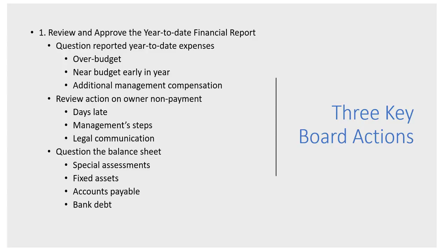The monthlies are okay. I'm not a big fan of monthlies myself, but you can go back to this and you can look at that year-to-date. So if you're in June, you could argue maybe that most of your contracts might be halfway through. So you could look at that and compare that to where you're actually at, and are you really at that 50% of the expected expenditures? If you are, I think everything's fine.